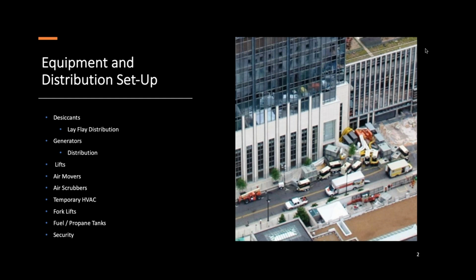You should have a checklist for job arrival and what you need to do when you arrive on the job site. And when your checklist goes to equipment location, lay flat location, and all that, then you should make sure that you cover that and have your forklift on that.